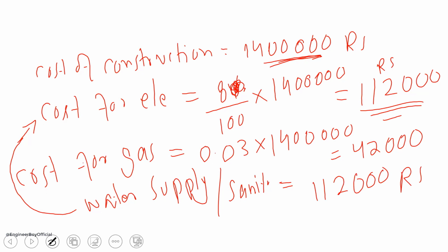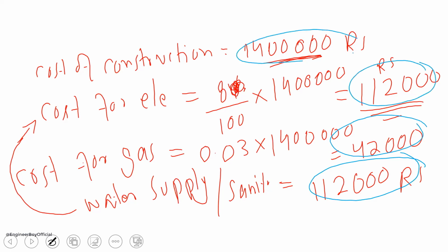Now we're going to have contingencies, but remember, before calculating the contingencies, we must add all these costs: this one plus this one plus this one plus this one.